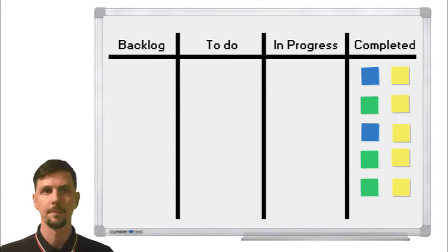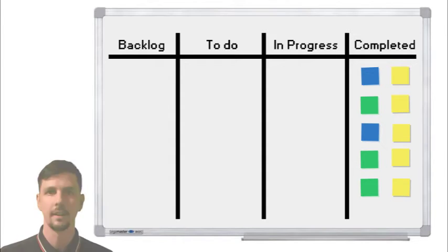If a certain column on the board begins to become overpopulated, a bottleneck in the project starts to slow the overall progress down. Any further movement on the cards should be halted, and everyone should aim to complete the tasks present in the overpopulated column. As a project progresses, some tasks may encounter problems that need to be addressed, resulting in additional cards being added to the board. Once all the cards have been sent to the completed column, the project is now finished and the whole process can start again for the next project.